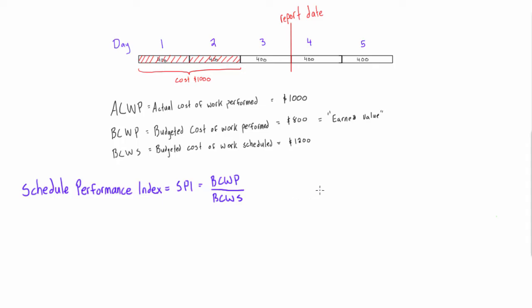But if we get an SPI that is less than 1, that's not a good thing and we're going to find that project is behind schedule.